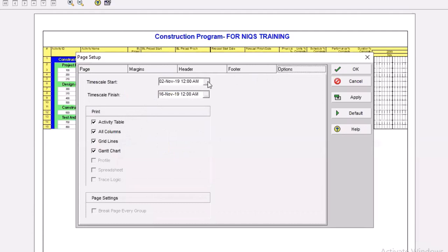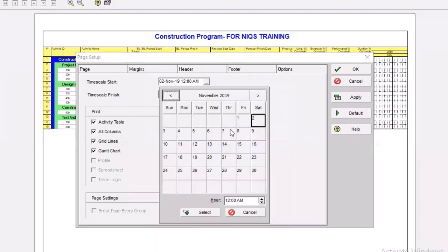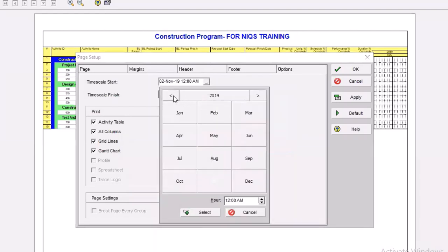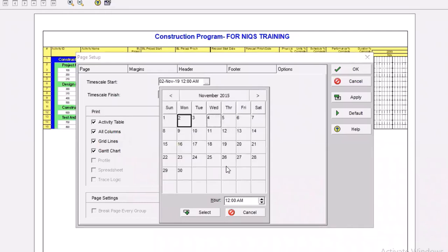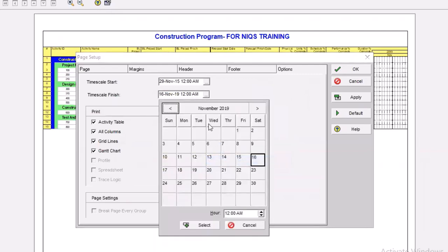You're choosing the dates as per that schedule. And you have to choose dates that are a bit behind. Okay? Your schedule is 2015. That's your start date, December 1st, 2015. So I'm going to choose a date in November so that my first day will show. I'll choose like 2 days back in November, the 29th, right? Then where do I want my time scale to end?